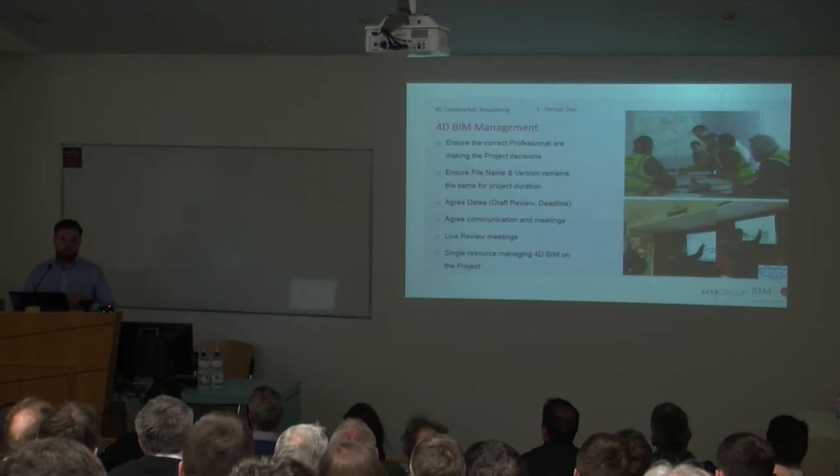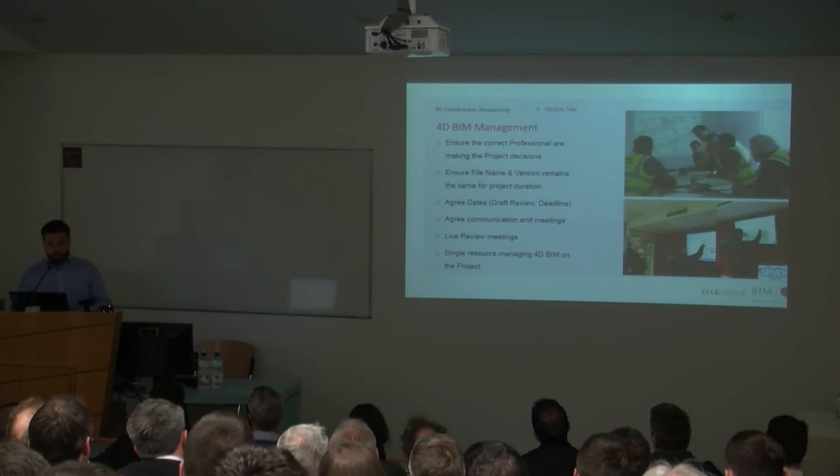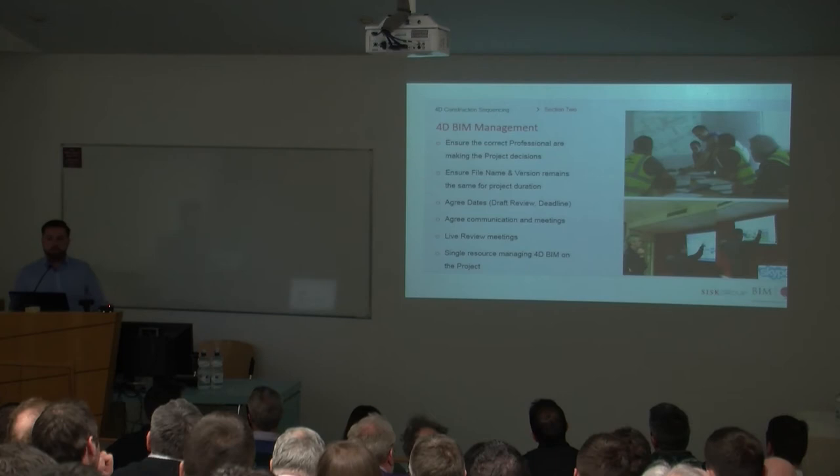This should be made from the project team. So as I said, I'd either go to the contract manager and say, look, if we're under pressure, just get a couple of A3s, sketch out what way you want to go about building the project, hand them over to me, and at least I can understand how he's going to go about building it. Then some people might mark it up in PowerPoint, but again, if you sketch it out, it's a quick process to get the construction methodology started.